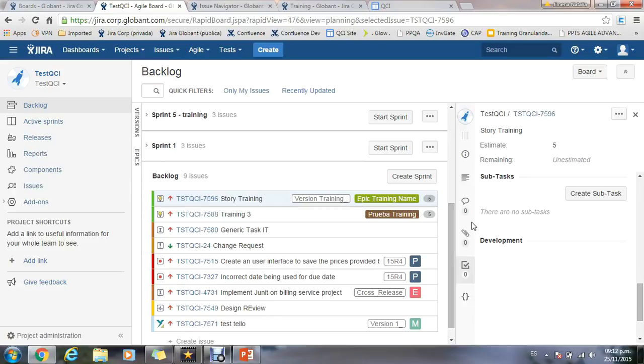At the beginning of each sprint, a planning meeting is performed in which all the agreements and commitments between the development team and the product owner will be generated. During the iteration planning or sprint planning, we will do the following things. To agree the iteration goals and negotiate which user stories from the product backlog will be committed to the iteration backlog. After that, we will break down iteration user stories into estimated tasks.